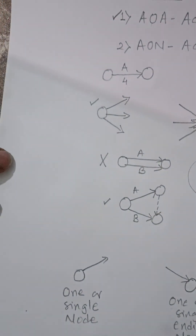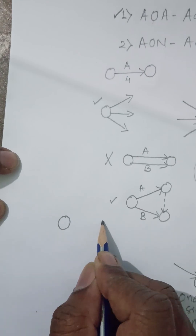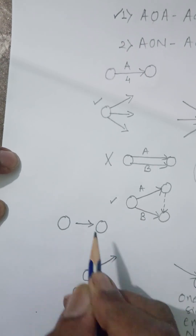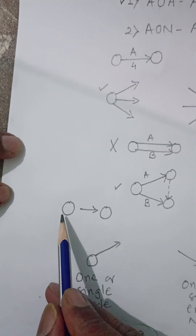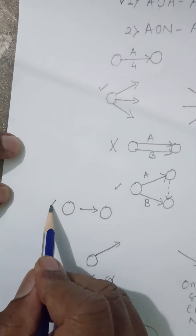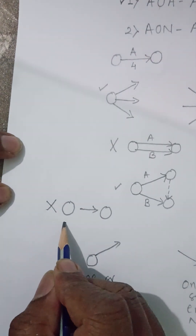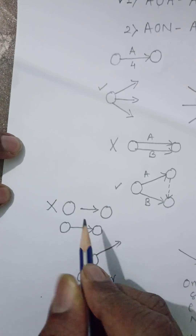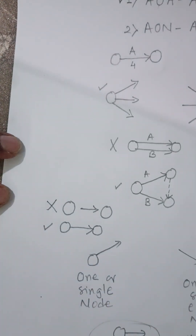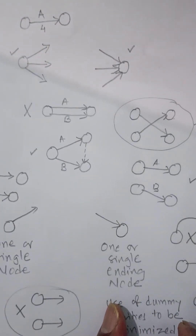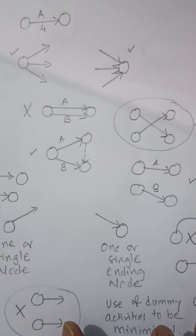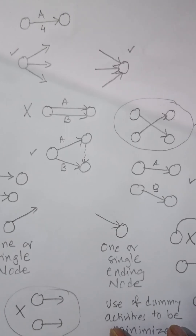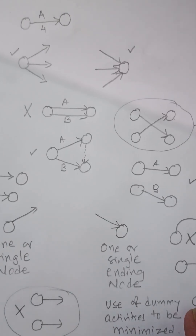Similarly, you should not have a hanging arrow — this is a very wrong way of showing an activity. The correct way is to always start an arrow from one node and end it in another node. These are the right ways and wrong ways of doing Activity on Arrow. In the next video, we will take an example and learn how to draw an Activity on Arrow diagram.